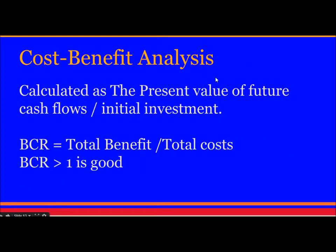Cost-benefit analysis is calculated as the present value of future cash flow divided by the initial investment. We calculate the Benefit-Cost Ratio (BCR) as total benefit divided by total cost. If BCR is greater than 1, it is a good investment.